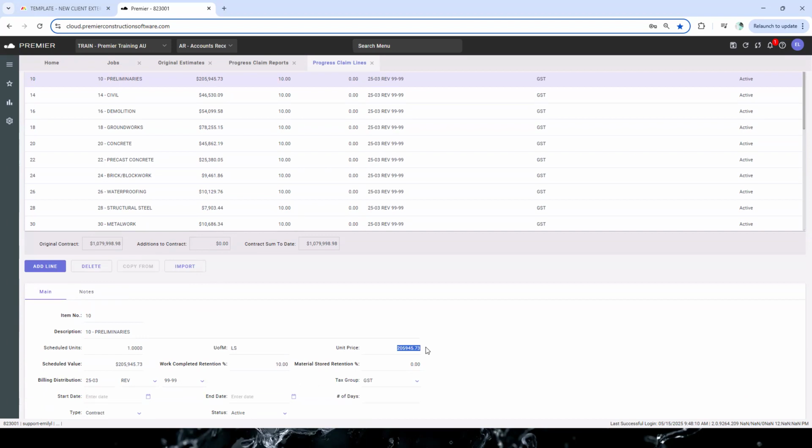Okay. Now, just bear with me while I get my trusty calculator and add this on. Plus, what did I say? Yep, 1.02, I believe. Okay, so let's update this. It is 205,946.75. Let me just save that. Okay, so there we go. Original contract is now 1,080,000. Okay, so we have this updated. So this is creating the basis for our claims going forward.